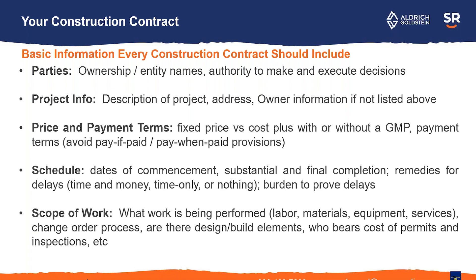It's also important to have a schedule in your contract. You need to know when the project is supposed to start, what the definitions are going to be for when it's substantially complete and when it's finally complete. If there's an architect involved, is the architect going to decide when substantial and final completion occur, or is that going to be up to the owner? It's also good to outline what the remedies are going to be if there are delays that are not your fault — are you going to get time and money, just an extension of time, or is there no damages for delay? Some contractors end up signing no damages for delay clauses, and then you have to fight about whether they're entitled to any additional funds when the project is held up and it's not their fault.